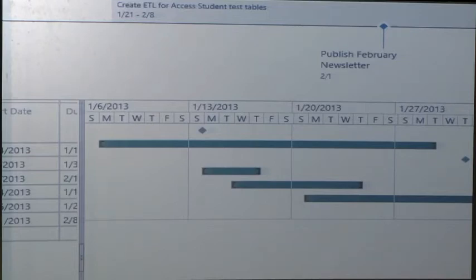Okay, you're behind schedule. Anytime the difference between the two colors, between what is complete and what isn't complete, occurs to the left prior to today, whatever today's date is, means you're behind schedule. Anytime that separator between the two colors is to the right of today's date, you're ahead of schedule. If you just happen to be right where today is, then you're right on schedule.